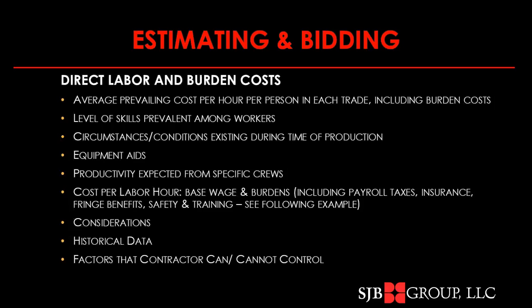Is the historical data from recent production experiences? Has the historical production been modified due to different conditions, this project compared to that one? Some alternatives might not be similar enough, so you might need to use alternative sources. By that, there are some publications that provide unit prices that I can find helpful from time to time. RS Means is one publisher that jumps to mind.